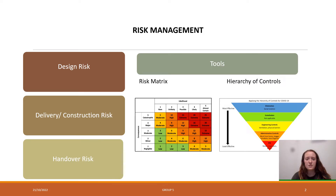A focus on engineering controls, substitution, and elimination hierarchy controls are necessary for this phase, with an urgency for procurements of subcontractors and construction materials, along with the stakeholder environmental management plans. Finally, our team were hoping to manage the risks during the handover by recording and documenting all testings and defects, gaining approvals for final building operations and commissioning of project deliverables.